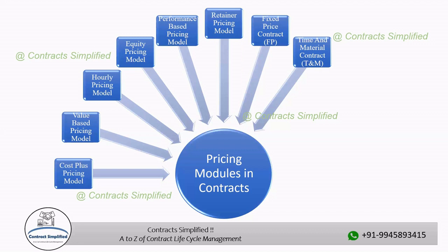In a T&M contract, the client bears more of the risk associated with the project changes and uncertainties. Since the final cost is not predetermined, the project might end up being more expensive than initially estimated. Proper documentation is crucial in T&M contracts. Both parties need to maintain accurate records of work performed, hours worked, materials purchased, and any other associated expenses. Sometimes T&M contracts include a not to exceed clause that sets a cap on the total cost that the client will pay, providing some cost control.